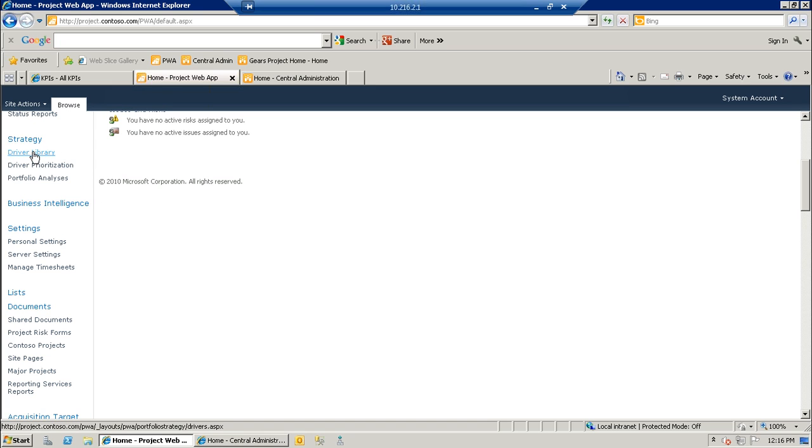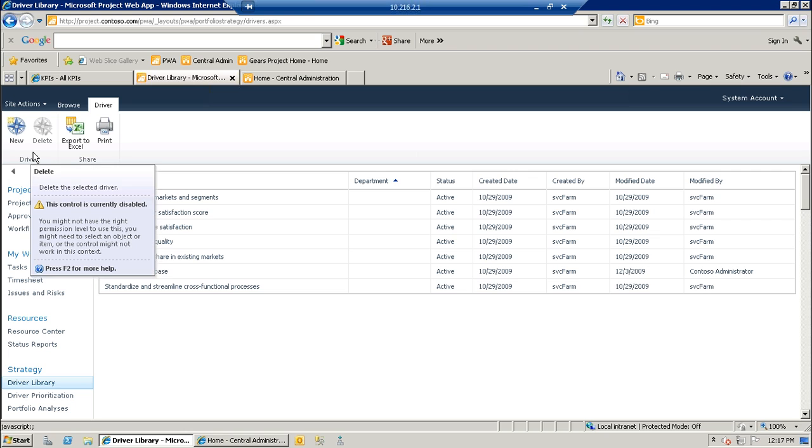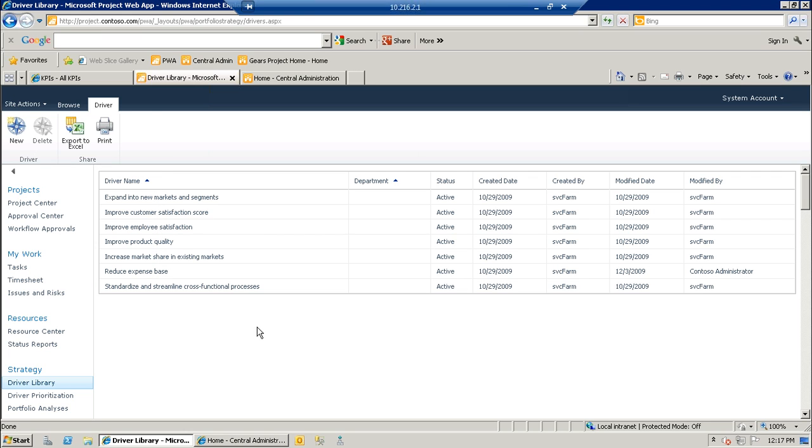In order to select the optimal portfolio, I start by identifying what's important to me in terms of what I need the projects to deliver. And I do that through the driver library. Again, these are quickly configured based on your business strategy and goals. Some examples here: I want to expand into new markets and segments, improve customer satisfaction, improve employee satisfaction, improve product quality, etc. These are basically how the projects get scored, and then you'll see how that rolls into the stack ranking, if you will, of all the projects.